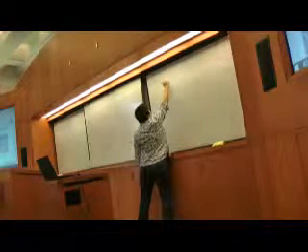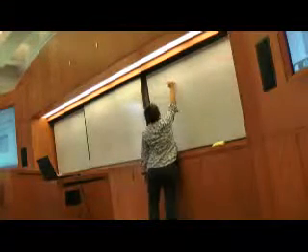That's the interesting thing about defining a goal. Because if you look, this is a log frame. It basically means A leads to B, leads to C, leads to D. It just has four steps. So this is sort of like your major outcome. In the best case scenario, what kind of inputs do I need to put in? What are some of those outputs? What are some of those outcomes? And then what is the purpose?